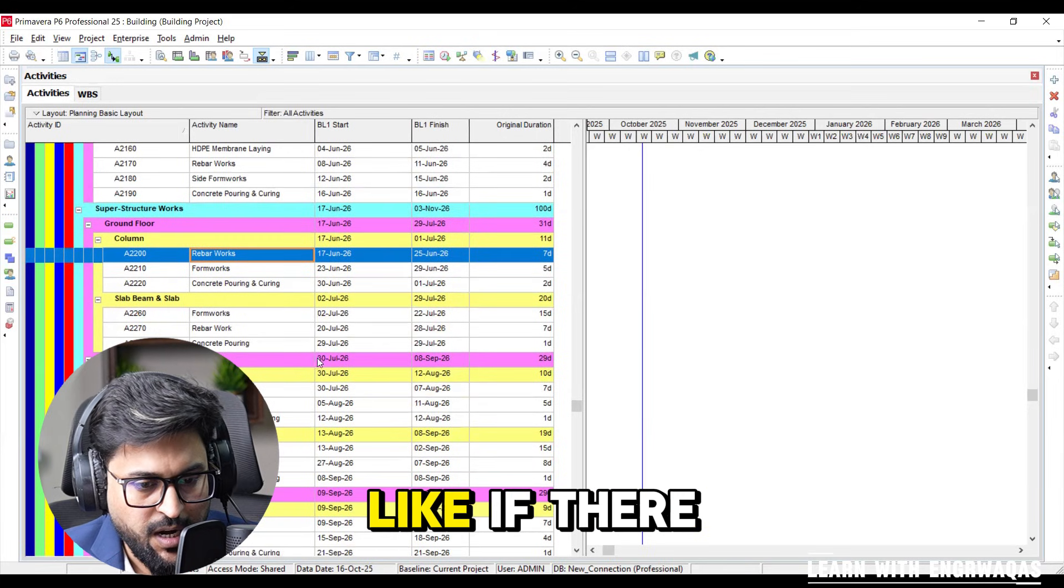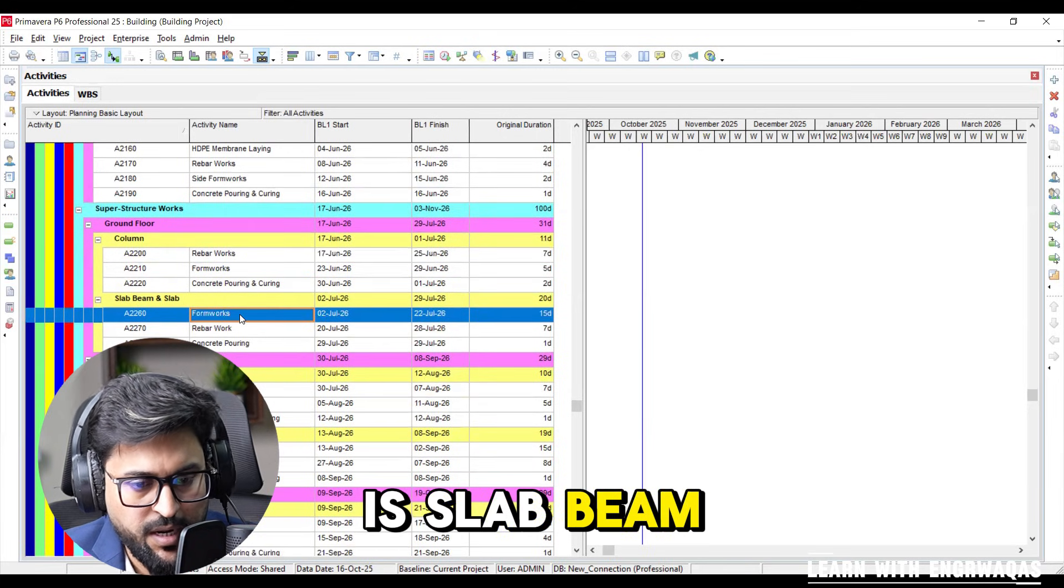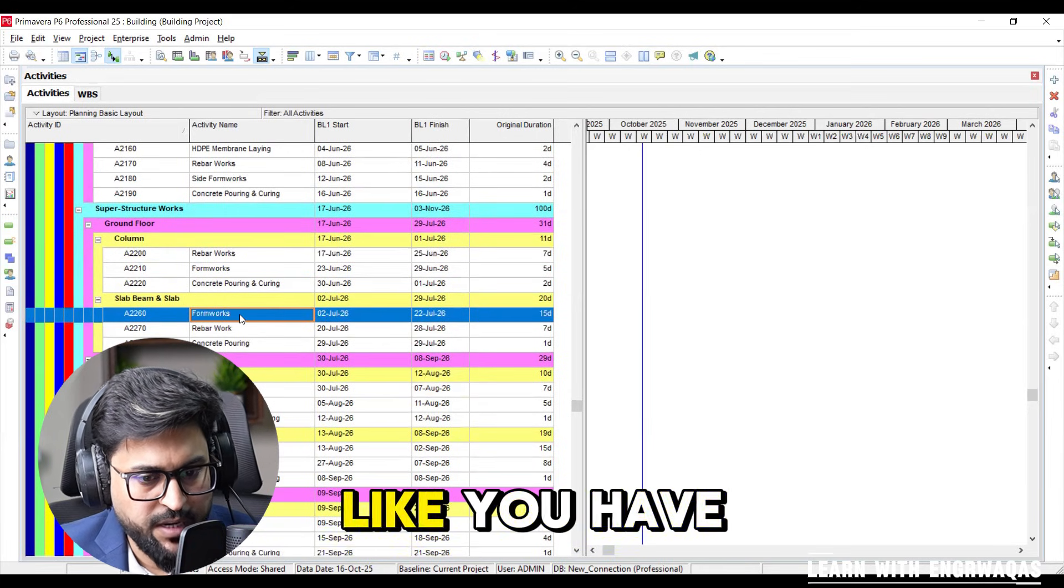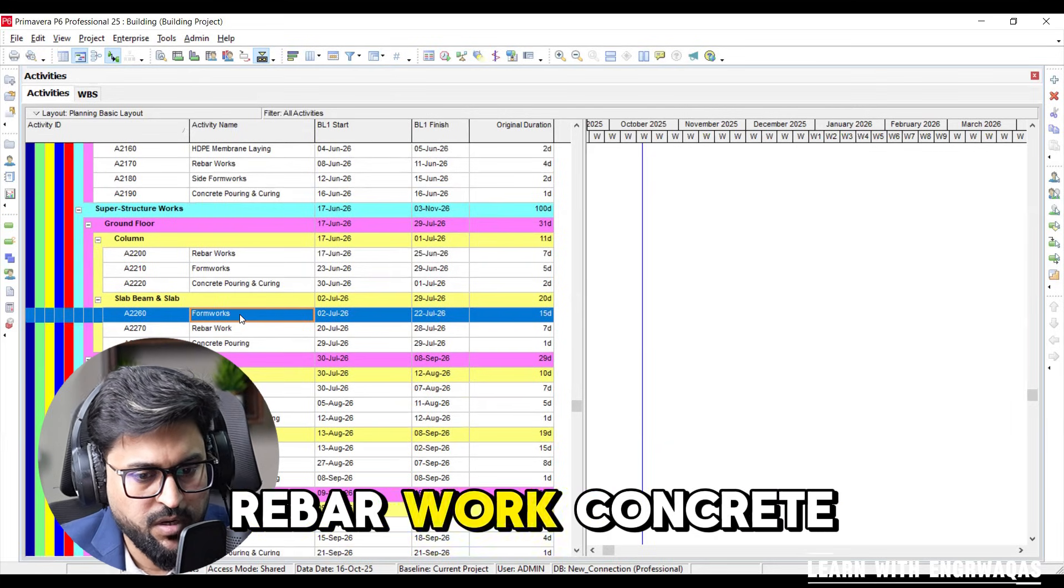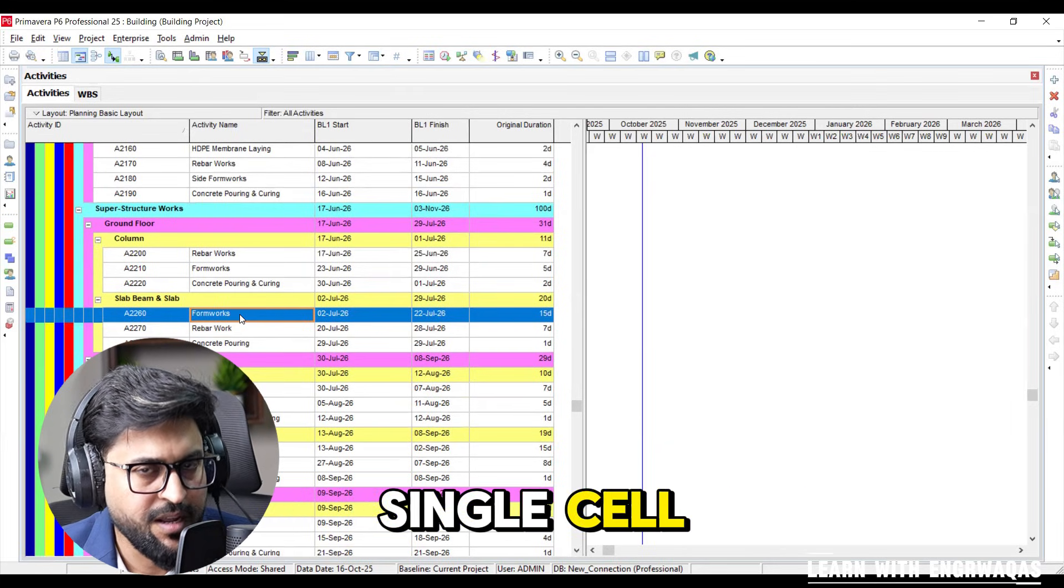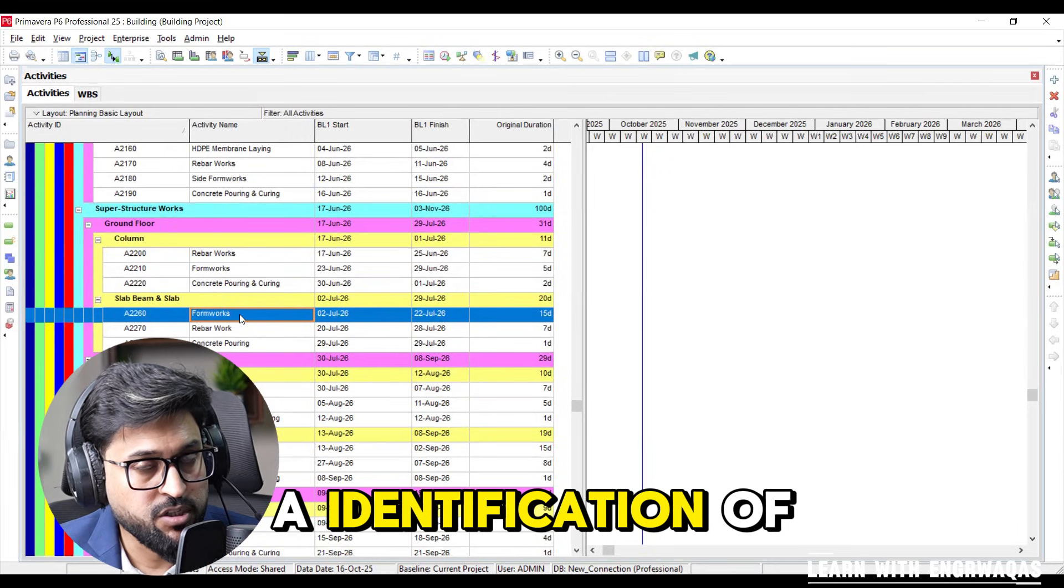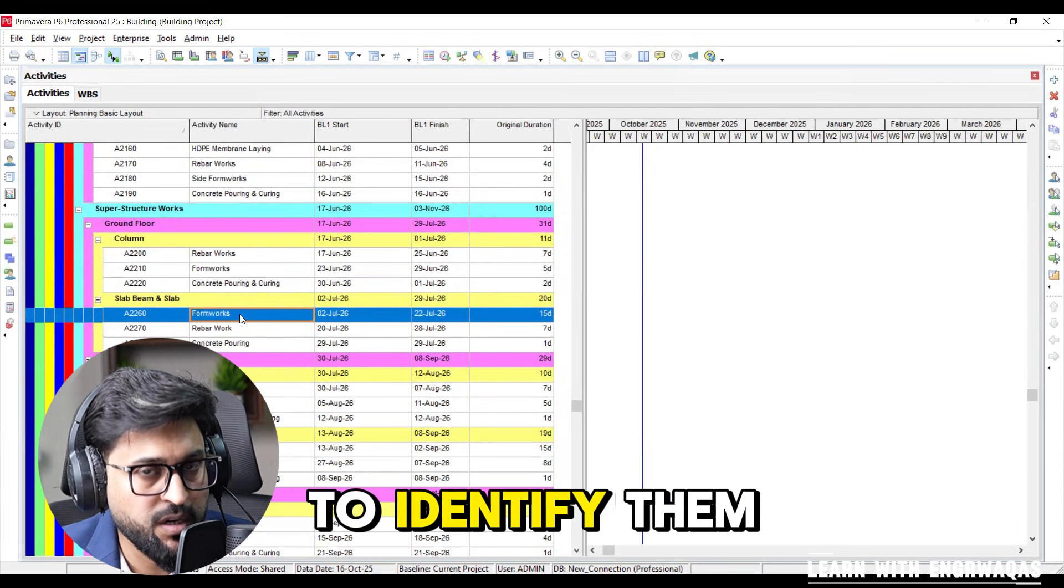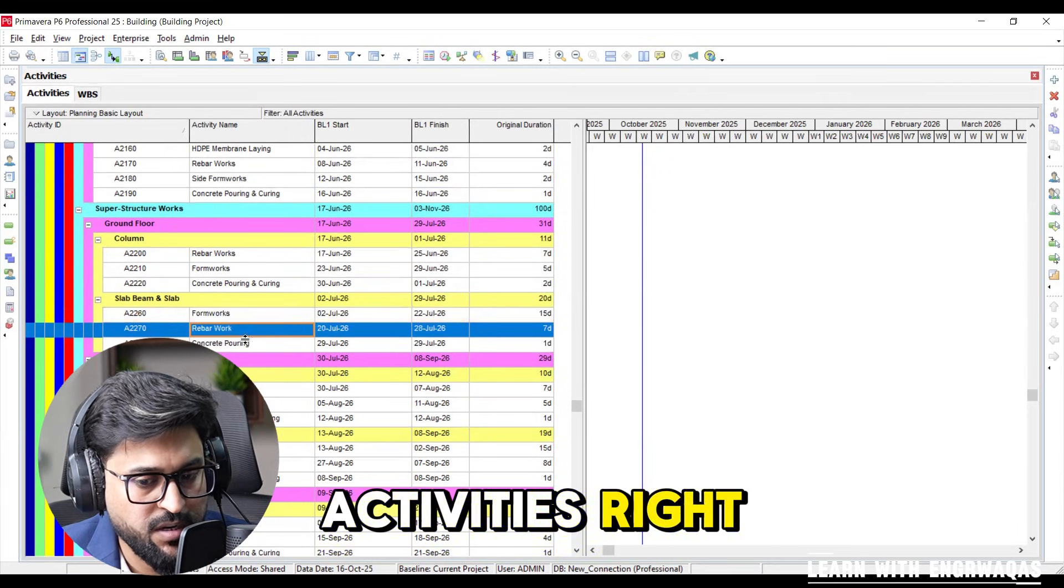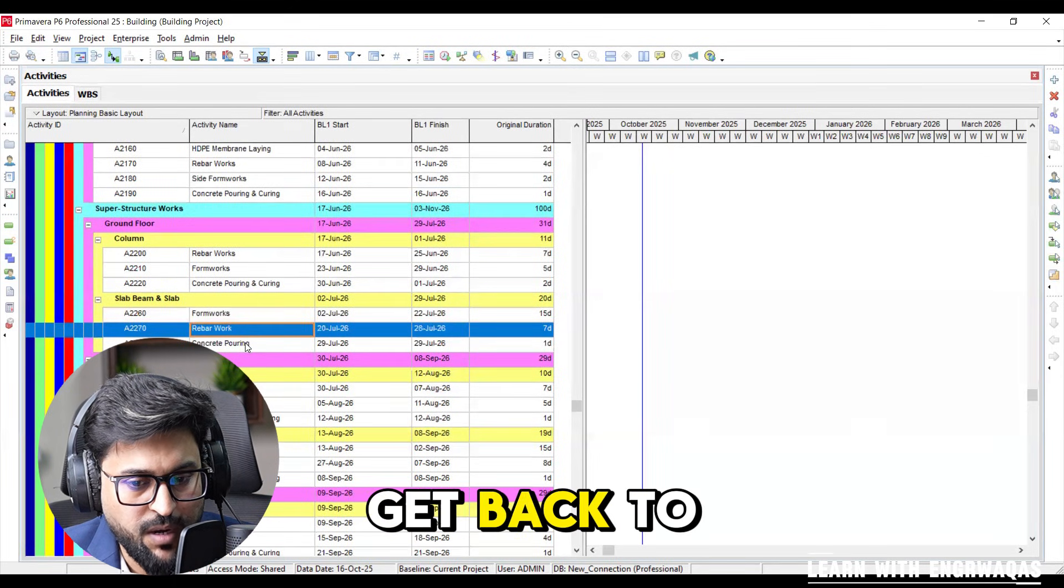Like if there is slab, beam, in that description it is given like you have to make formwork, rebar work, concrete pouring, maybe in single cell. But here as identification of a separate task you are going to identify them as separate activities.